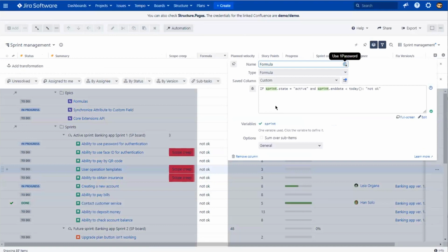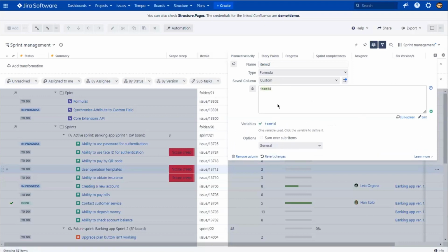The only thing is that you might try to put these functions specifically for the sprint row. So if I put item ID, I should be able to see the item IDs. So it's the sprint type. If you have some complex hierarchy, you can say if summary equals that sprint name, put the formula on this particular row. But otherwise, a standard sum over story points should work absolutely the same as my example with the epics and stories.